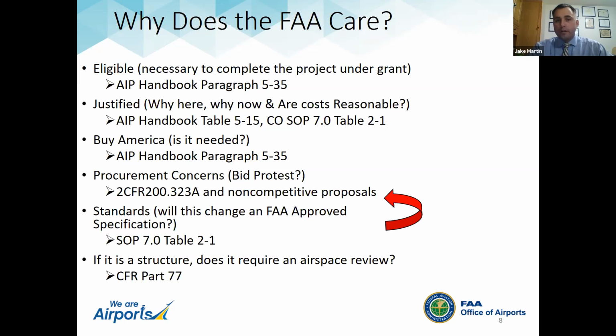However, we rely on the sponsor providing a statement to us that they provided a cost analysis and looked at the pricing. They may rely on an independent engineering estimate from their engineer of record on the project to say, "Well, here are some examples of bid prices we received on other projects in the last 12 months, and we think this is a reasonable cost." The sponsor can use that to make their recommendation to us.